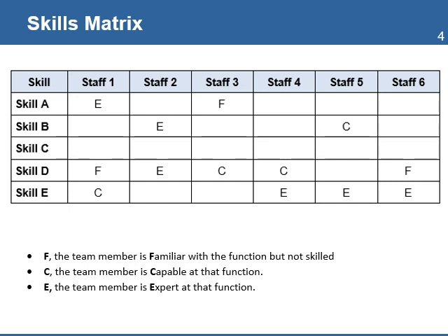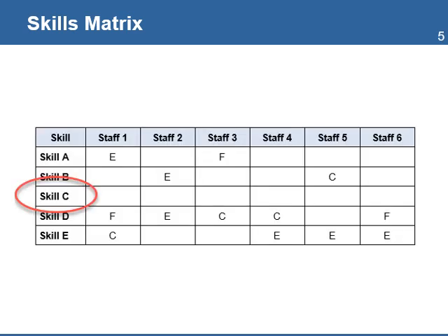It is a useful tool to identify the level of expertise of all team members and to identify whether the skills required by the project are balanced enough. This matrix is used in the development of the team training plan and can serve as a baseline to monitor progress. You can use the skill matrix as a guide for the development of a training plan for the team.